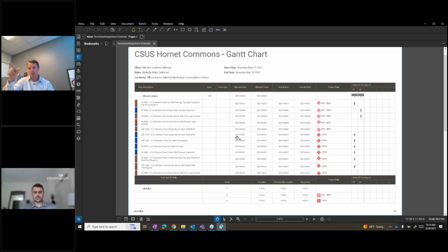We'd be taking this chart and our iPad out into the field, checking off, making sure things were done, and updating that. That would then push this information forward to tell us, okay, there are 12 inspections that we have scheduled for tomorrow. We're ready on all 12 of those, and then we can order those with the inspection team on what's the priority.